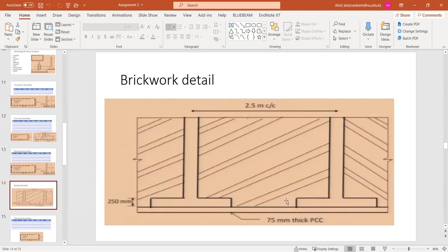But you can say that, but from the resource point of view, for this we may need to consider as well, because if we have different crews for brickwork and for concrete, which is most likely the case for the projects, because now the works are more or less specialized. So you will most likely be having different crews for the concrete work and for the brickwork as well.